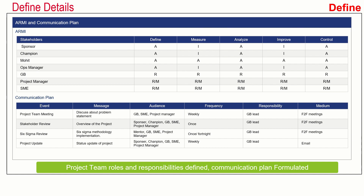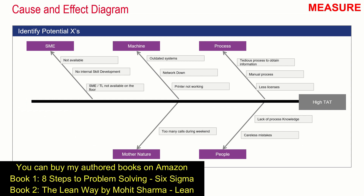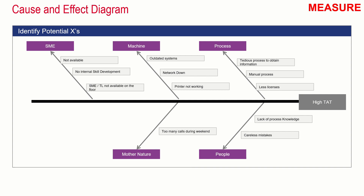The team then got into a room for a brainstorming session to create a fishbone diagram. The head of the fish represents the problem — the effect — which is high turnaround time. Causes identified include: under process — tedious process to obtain information, manual process, and fewer licenses on the floor. Under people — lack of process knowledge and careless mistakes. Under mother nature — too many calls during weekends. Under machine — outdated systems, network down, printer not working. Under SME — SMEs not available, no internal skill development program, and TLs or SMEs not available on the floor.